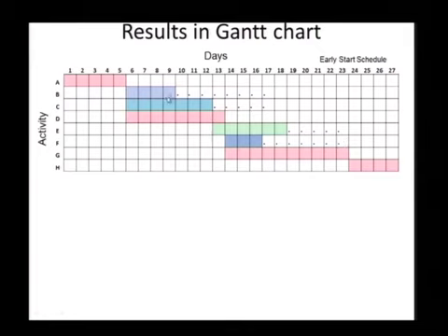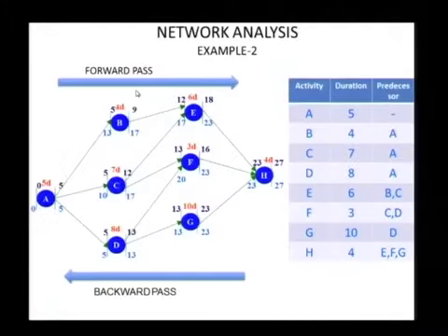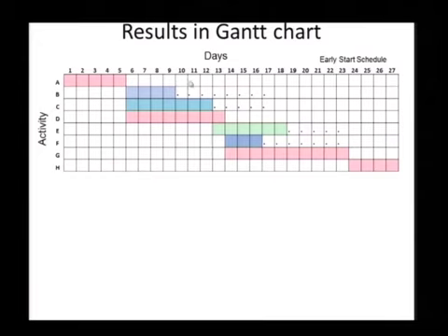But can I, for example, start moving one of these activities all the way to the end? What will be the impact? Yes, the succeeding activity will have to get delayed only then. So if I delay, for example, B, and I go back to the network, obviously it will impact E. So if I delay B here, E will also move down, right? I cannot delay B beyond a certain stage. So how much can I delay?